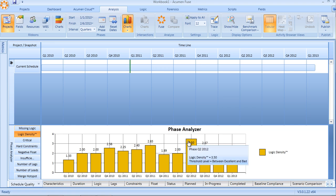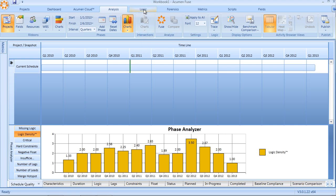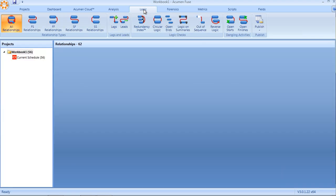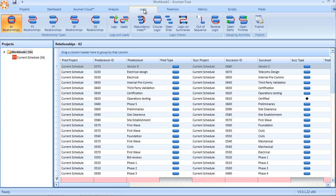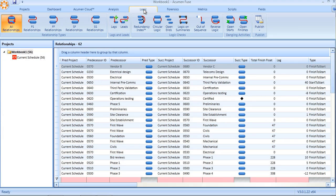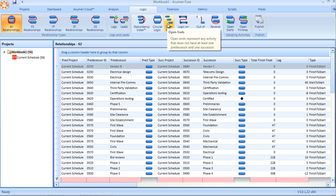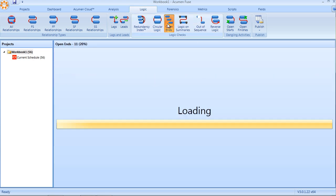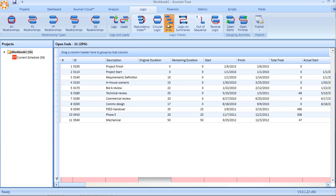An excellent way of understanding where in our schedule we need to focus our resources on improving the quality of logic. Taking logic analysis a step further, within the logic tab itself within FUSE, there are more detailed logic checks pertaining to not just open-ended logic looking at missing predecessors and successors, but what we call hidden open-ends in the form of dangling activities.